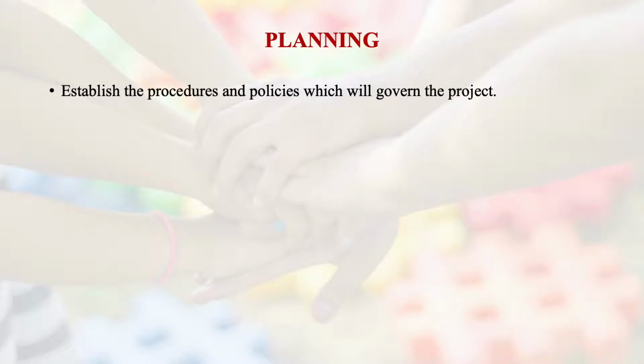Well, what we have already stated is that when we are computing the project time, we have the ith node as well as the jth node. So the ith node is the ith event, the jth node is the jth event, and Tij is the time taken in the activity where the predecessor node is I and the successor node is J, which is where the tail node is I and the completion node is J. And EI is the earliest occurrence time for this particular event, and Li is the latest occurrence time for this event, and EJ accordingly for the other one.